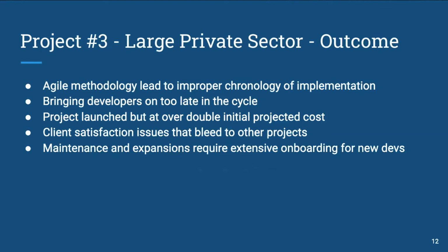You can't just move things around in a Kanban board as easily on full stack projects, I have found, just because the client wants a certain functionality first without being really careful about it, and without figuring out what the ripple effect is going to be down the road. And then bringing other developers on too late in the cycle, ballooning from 2 engineers that know everything to 7 and trying to play catch up, meaning you're doing the onboarding, the local environment setup, you're doing the educating them on what the system is, how the data model works, what is coming when. It's a lot of moving parts later in the game. And that was a real struggle that led to a lot of confusion. Not everybody's on the same page at once. Everybody's skill set is slightly different, all of those things moving.